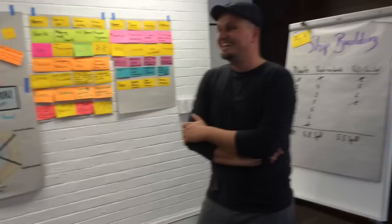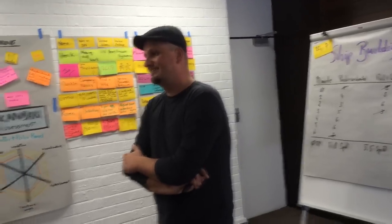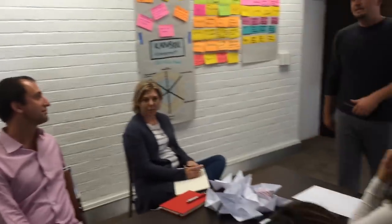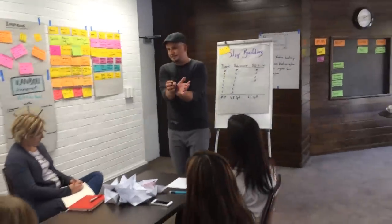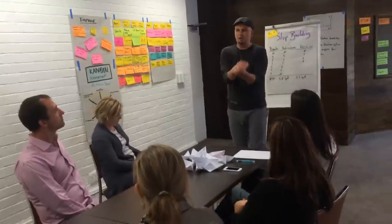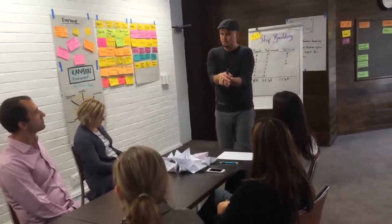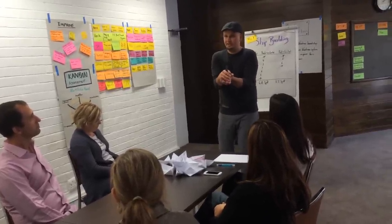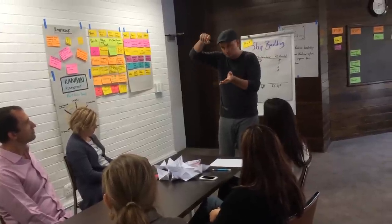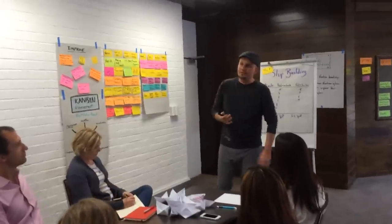Also, the issue with bottlenecks: the sales area didn't have any idea what's happening in the background. Exactly. In the back office we have so much work to do, let's just start it. I mean, why should we wait, right? But the point is, we had a bottleneck here, and the overall throughput of a system is determined by its bottleneck. That's nothing new. We've known this since we first came into contact with a funnel, right?